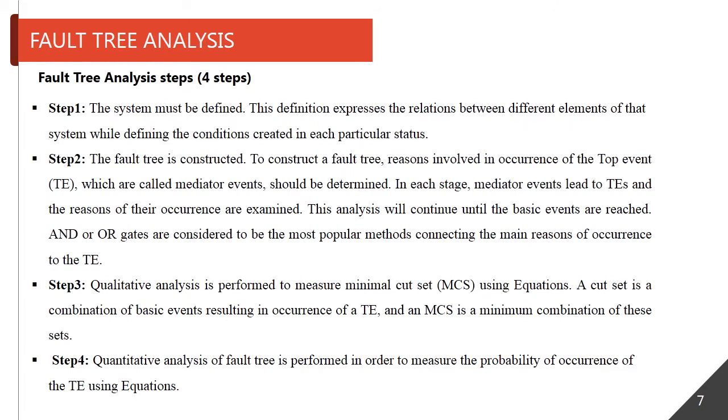Fault tree analysis steps. We have 4 steps in fault tree analysis. Step 1 is definition of the system. The definition expresses the relation between different elements of the system. Step 2, construct fault tree.